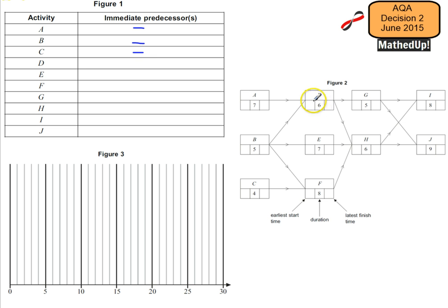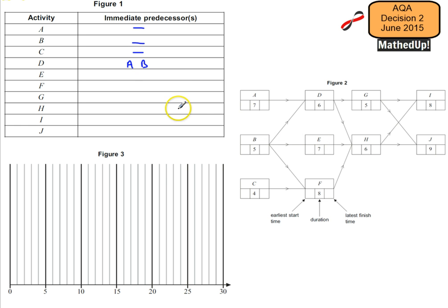In order for activity D to start, A and B would need to be completed first. In order for activity E to start, B needs to be completed before that can happen. And for F to start, B and C need to be completed first.